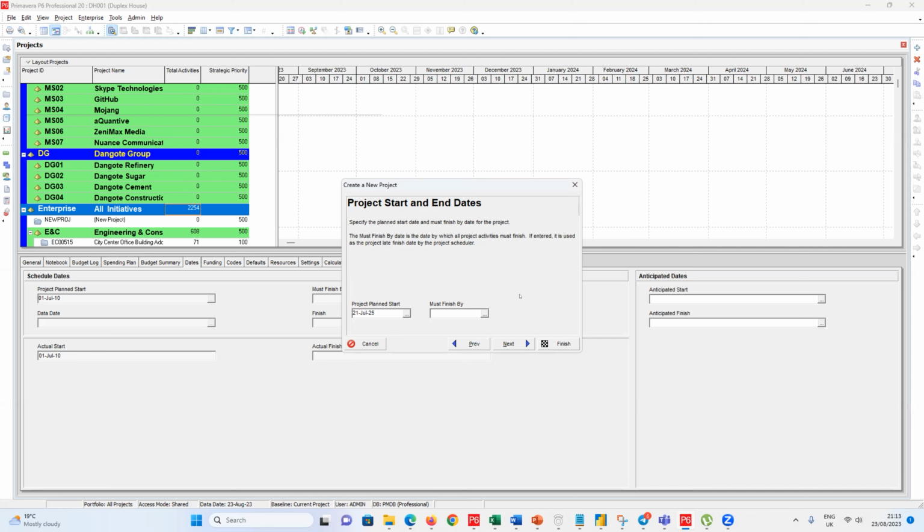You can't move the World Cup when they fix it years ahead. I worked on the London 2012 Olympics. You can't move the start date. They will spend any amount of money to start on that day.